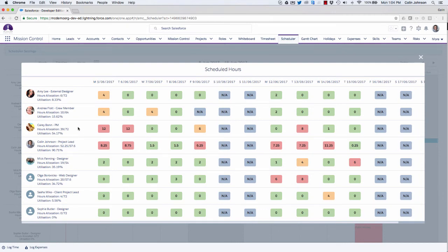So you can see here I've got Kerry having 2 very busy days, Monday and Tuesday, and then pretty much nothing Wednesday or Thursday. So what we'll look to do is maybe balance that out and reschedule some of that there. And same on this one here. I can see that it hasn't really been evenly distributed, so I might want to sort of balance that out through this week, or maybe try and reschedule to some of my other team members. So I can use that to just fine-tune the allocations.